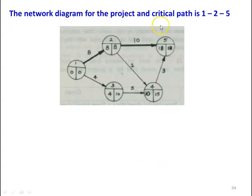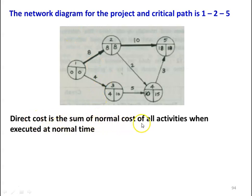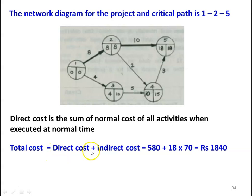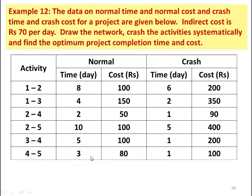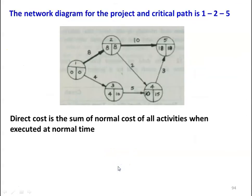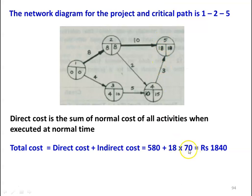The network diagram for the project is drawn and the critical path is identified. The TE and TL values and slack values are calculated. The critical path is 1-2 and 2-5. The direct cost is the sum of normal costs of all activities when executed at normal time. The normal duration is 18 days. Total cost equals direct cost plus indirect cost: direct cost is ₹580, indirect cost is 18 days × ₹70 = ₹1,260, giving a total cost of ₹1,840 at normal duration.